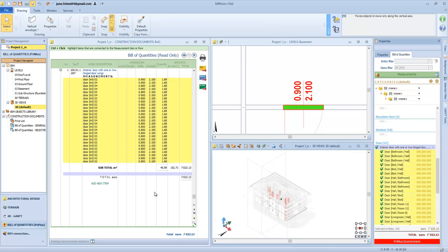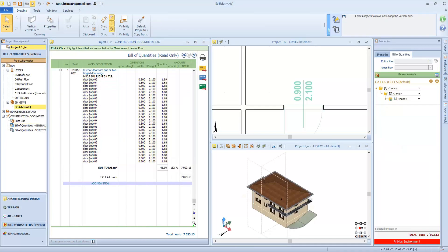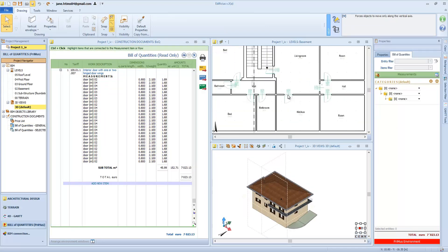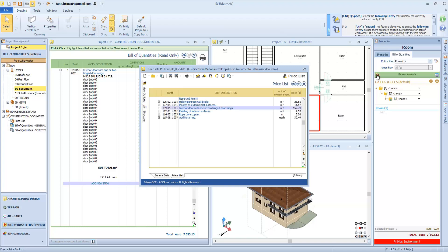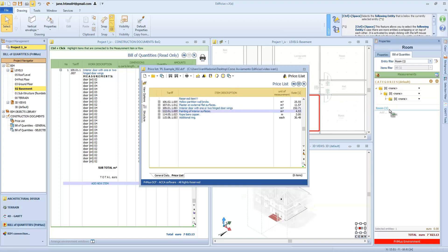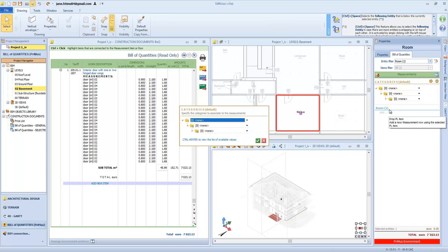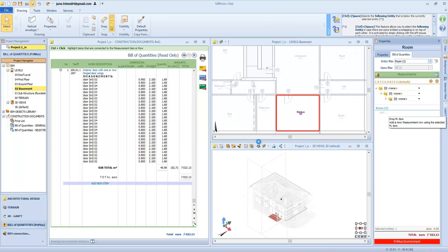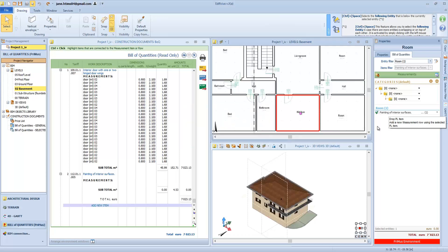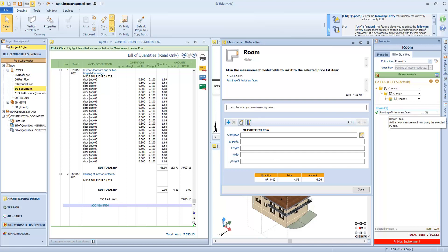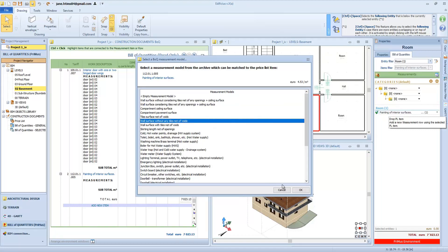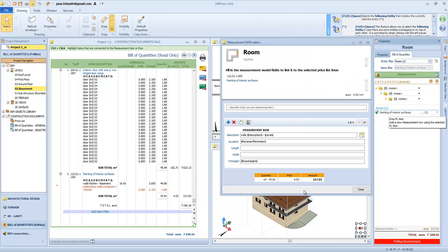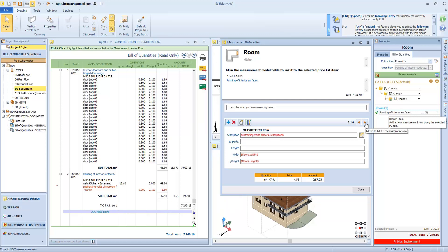Let's see this aspect again when dealing with wall rendering and plaster. To estimate the interior plaster of this room, we will select it, open our price list, and check among the various items, for example this painting item here. We can use the software formulas by clicking on the white sheet button and choose the type of measurement method we want to use, for example the wall surface without tile, so we will subtract any empty space. The software is calculating the perimeter of the space and multiplying by height. Notice that the software has already subtracted the empty areas, such as the openings and the windows, by adding them to the list here.